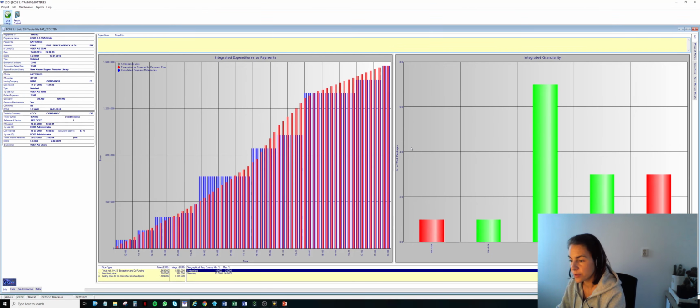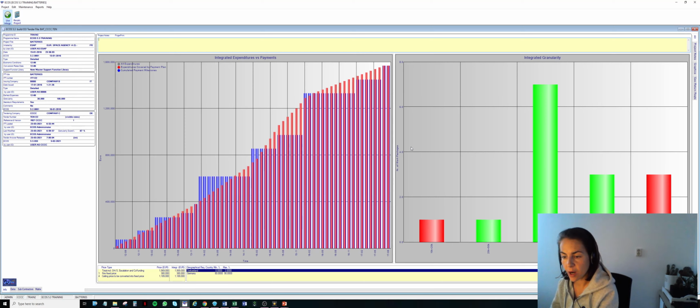So where we want to bring our attention on this screen is that, in fact, you see at the bottom our tabs are different. This is because we are now in a tender file. You notice that the WBS, the cost, summary, tender, and integration tabs are not available anymore because we don't want to work on this file anymore. This is the static picture of our tender at this specific point in time.